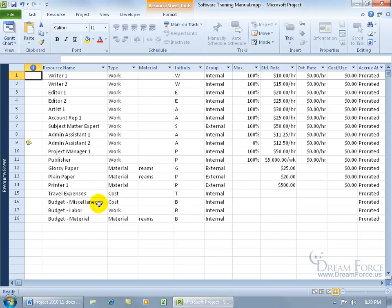For budget cost, how much am I setting aside in currency for my cost resources? Well, it's just the one here — the travel expenses. Let's say it's going to be $2,000. I'll show you how you can assign $2,000 to your budget cost resource.